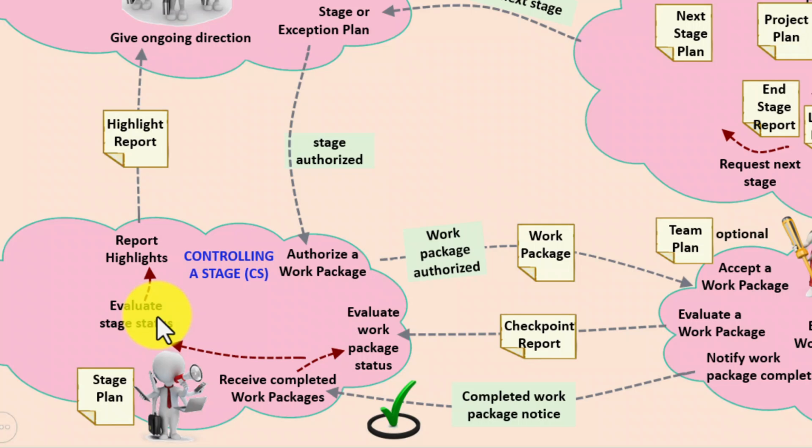For example, external markets or commercial situations may change, meaning that maybe we need to make micro adjustments within the stage. And this is important. This isn't, oh dear, we've blown tolerance, we've got to do something different. This is the project manager steering the ship through rough seas and taking slight deviations to actually keep on track to reach the next port. So this is called take corrective action. It's small actions that need to be taken quite naturally and normally within a project. These would not be happening unless the corrective action is going to fix the small deviation.